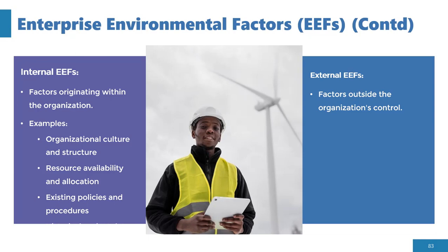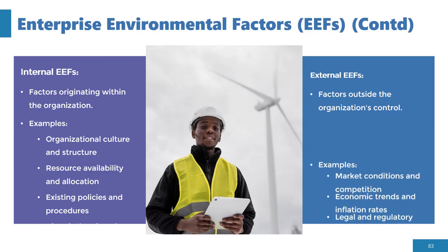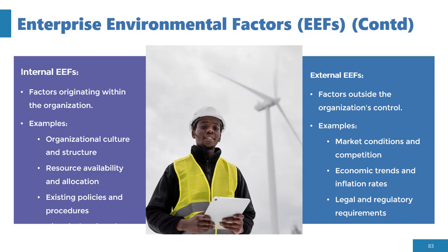But the external EEFs, you have no control over them, and this includes market conditions and competition, economic trends and inflation rates, and legal and regulatory requirements. You as a project manager, and even the project organization, have no control over these factors. They are within the macro environment, so there's almost nothing you can do about them apart from adjusting yourself, adjusting your systems, adjusting your strategies to align with these factors.